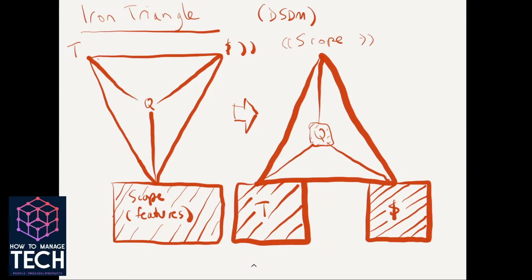All of our features will now be prioritized according to this scheme. The must-have features have to be delivered, which makes sense, right? The should-have features are very important to have in there, but they can be left out as a last resort to protect the time and the budget without threatening the whole project. Could have, nice to have. We're actually going to use a ratio here, but we're going to allocate an upfront amount of effort of 60-20-20.